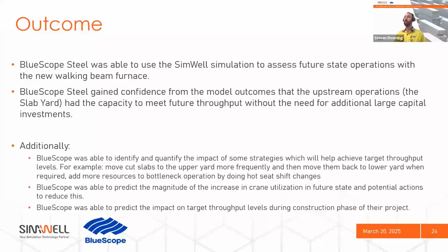SimWell were very easy to work with for making some changes to what the future state vision might look like, to do multiple smaller scenarios, and we were able to identify, starting from a situation of many multiple millions of dollars contingency, with some suggestions on what changes we need to make to our project, which are even multiple times what our contingency was, a couple of sub-$1 million opportunities that we could add to our project that would significantly enhance the overall outcome.